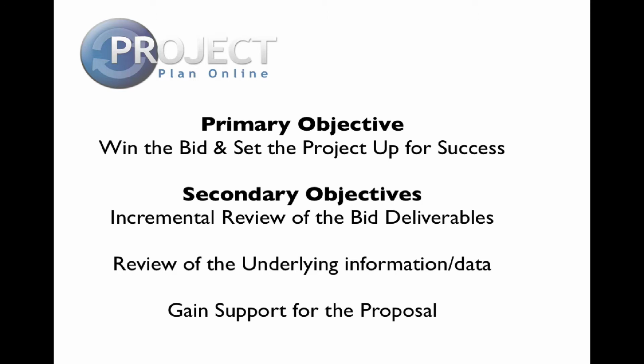Worse than this massive workload, if one or more deliverables is wrong, if the estimate is too high, if one of your authors has totally missed the point, you have no time to make any adjustments. You need a system in place that checks progress of the deliverables, adherence to the bid strategy, and inclusion of the win themes. Having this system in place helps you catch any misalignments in your strategy and ensure the physical progress of the deliverables.